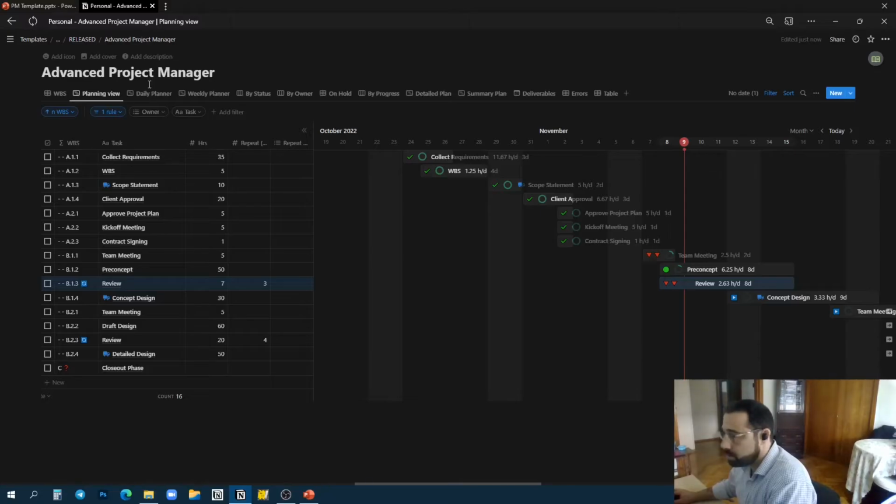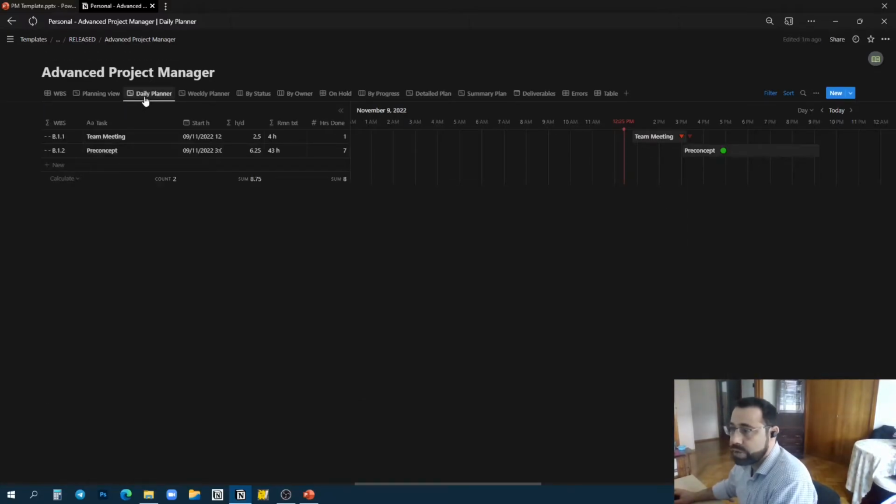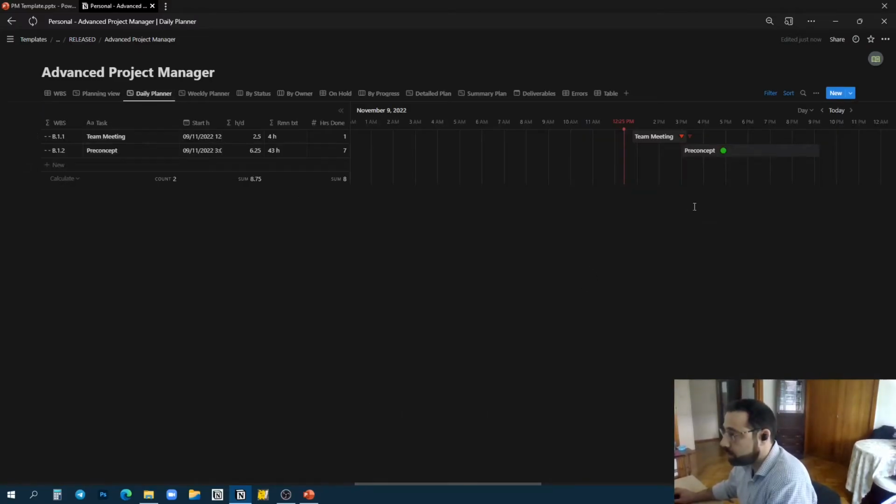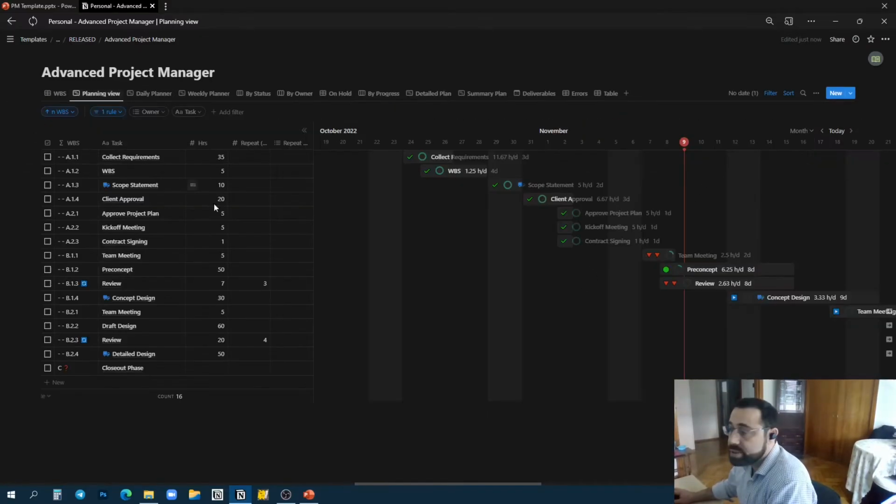Now, let's have a look here. I want to check something. In your daily planner, you will notice that you have team meeting and pre-concept. But over here, it's supposed to have team meeting, pre-concept, and review. But the review is not showing here. Why? Again, because this is a recurring task that appears every 3 days. So the first time it appeared was on the 8th. Today is the 9th, so there is no review. It will appear on 11. You will have the first review at 8, the second at 11, the third at 14.